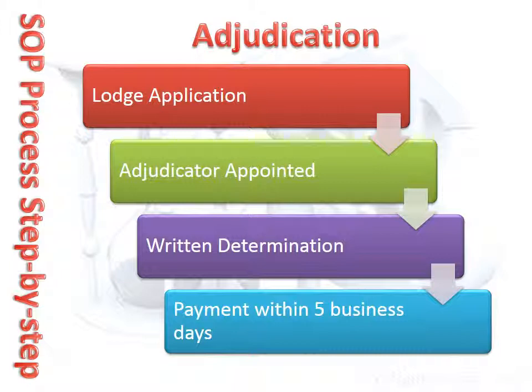Under the Act, the adjudicator must take into account the Act, the contract, the payment claim, the payment schedule, if any, the adjudication application submission, and the adjudication response submission, if any. The adjudicator will normally determine the matter on the documents only, but the adjudicator may request further information, a site inspection, or a meeting of the parties. Apart from the occasional request for further information, directions for a meeting between the parties or site inspections are very rare. It is for this reason your documentation has to be spot on.